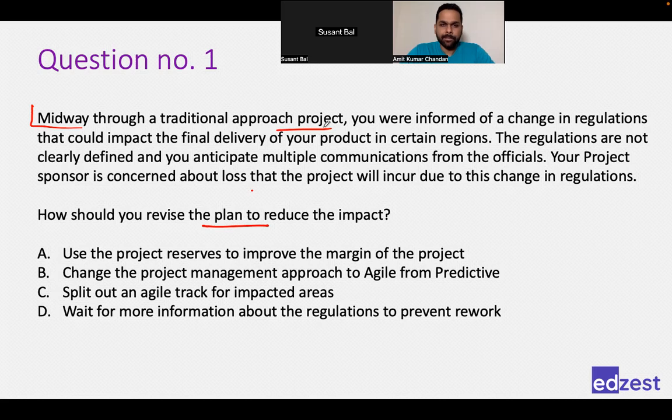My third point is, now, since we are getting this risk during the midway of the project or execution phase, then which may result in changes to my cost estimation also. Yes. Right. So my cost baseline could change because I am changing my approach plan itself. Correct. Absolutely. So that also needs to be updated again. Yes, 100%. Then, if it is like a change, it is turning out to be a hybrid. Then I may have to go for the change management, CCB approval also. Yes.